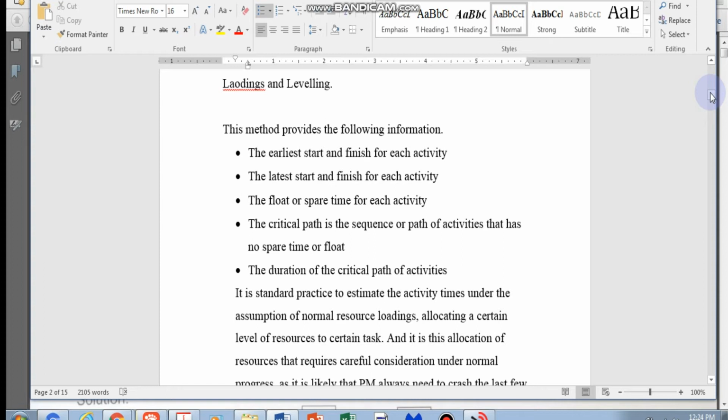So these are the analyses that critical path analysis, or the critical path method, will provide you with. Okay, and the other name for critical path method is PERT, P-E-R-T. In many books, and a lot of project management books, they talk about PERT, but PERT actually deals with a probabilistic method, meaning that the calculations are based on probability, which we are not going to learn here.